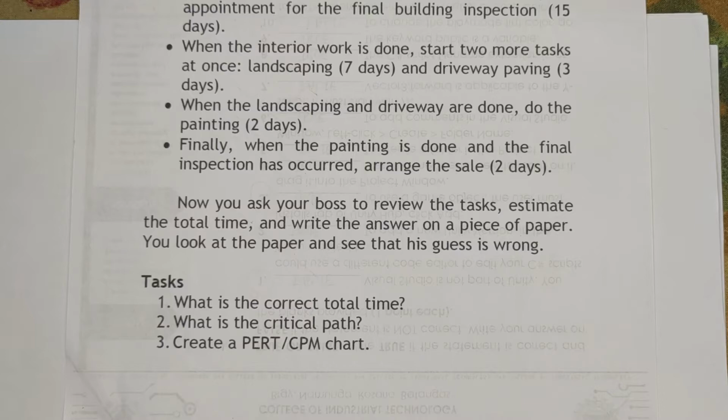Again, for creating a PERT CPM chart, we need to list the tasks. Actually, based on the problem, this is easier because it has already indicated the duration and the tasks are almost already outlined. But in a real world scenario, as you could remember in our lesson, there are times that systems analysts are the ones who extract the tasks from the document and then estimate the duration by means of the formula: the best case, plus the probable case with a weight of times 4, plus the worst case, with the sum of these 3 divided by 6.